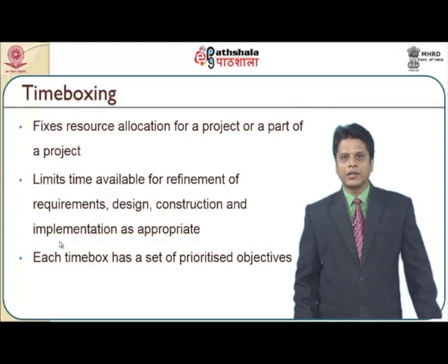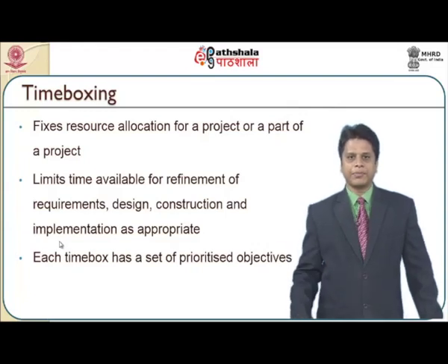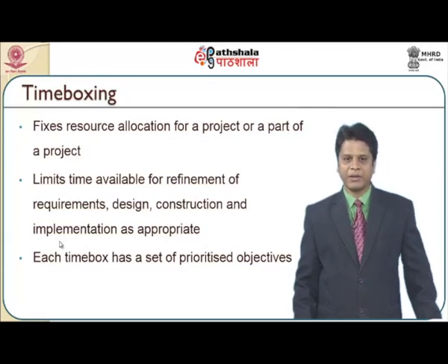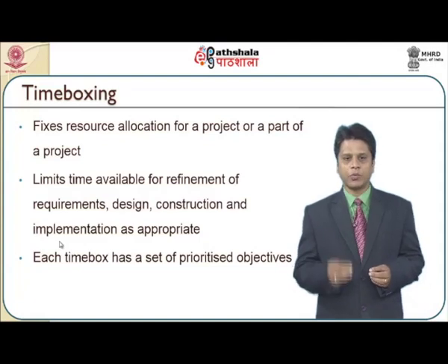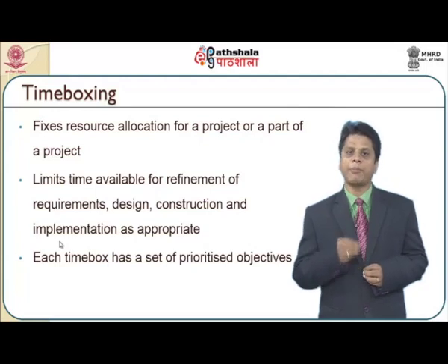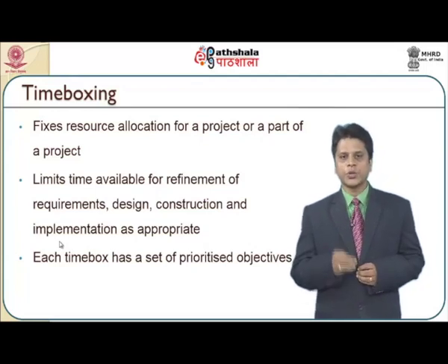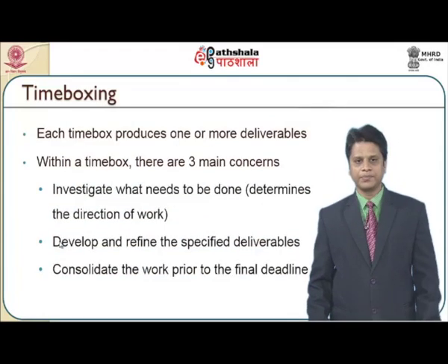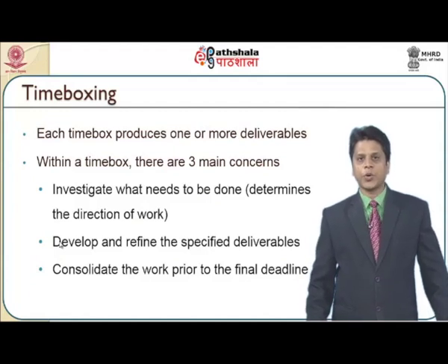And further, it restricts itself within the time, so time boxing is also taken care of. It fixes resource allocations for a project or for a part of a project. It limits time available for refinement of requirements, design, construction and implementation as appropriate. These terminologies like requirements, design, construction and implementation are majorly used in the rapid application development model phase. Each time box has a set of prioritized objectives which are clearly defined, and each time box produces one or more deliverables.